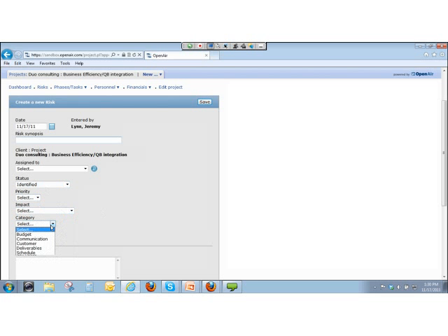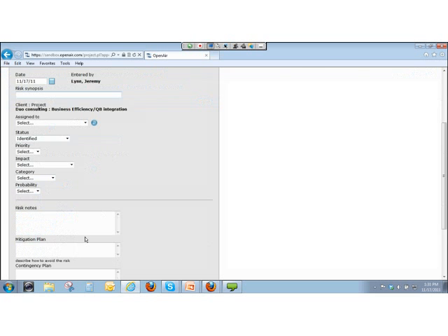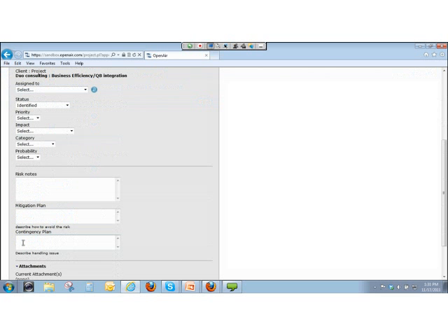What kind of risk is this? Is this something related to the customer? Is it something related to how communication is being done or deliverables are being made? And then what's the probability that this risk will occur? If you have a high probability, high impact, high priority risk, that's something that should get a lot of attention for both a mitigation plan and a contingency plan in case that risk cannot be avoided. Okay. You could customize this with all kinds of feature functionality.